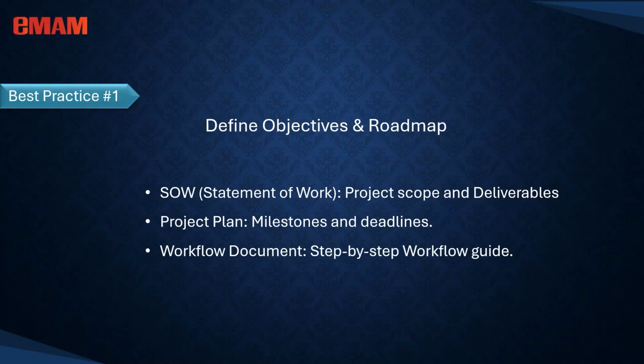Three core documents make this happen. A statement of work that defines the scope, deliverables, and responsibilities, so there's no surprises later. A project plan which sets the milestones and timelines to keep the deployment on track. A workflow document, a visual step-by-step workflow guide which documents the customer's end-to-end workflow from ingest to archiving, distribution, etc. So together, all these documents become the single source of truth for the entire implementation.